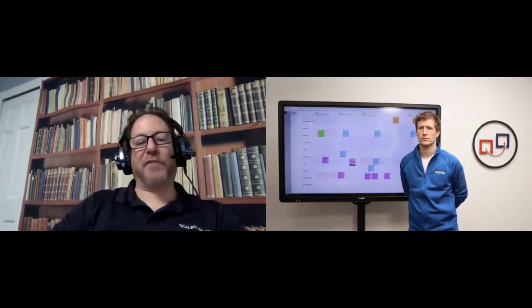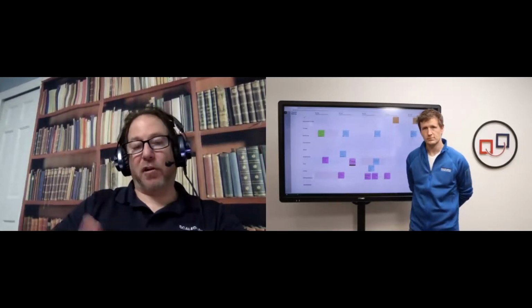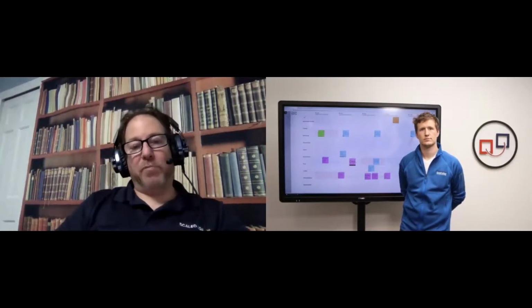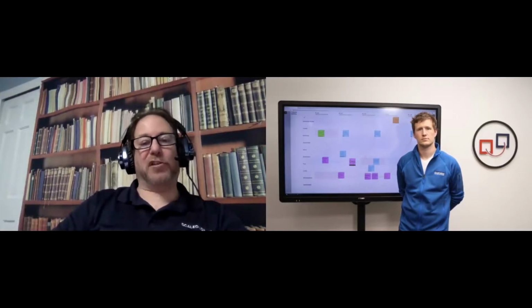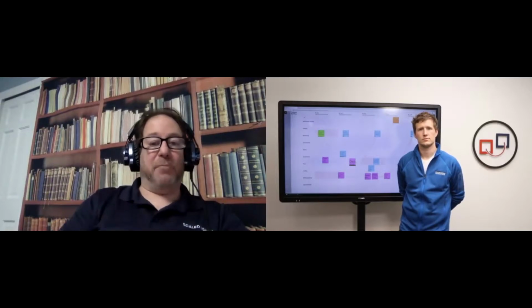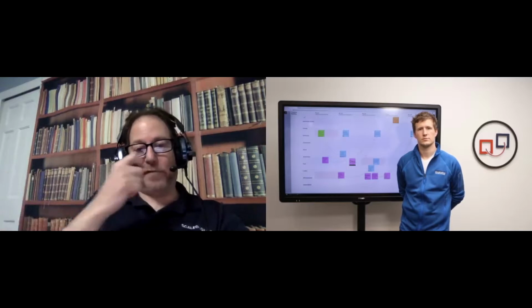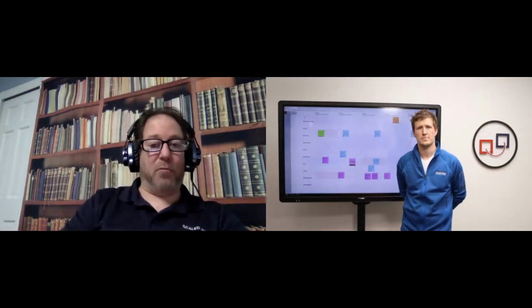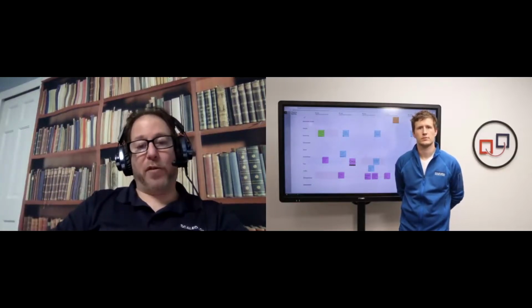So sometimes you have to have more written communication as a result. That's what I mean. You aren't always able to have overlapping time periods. So, for example, sometimes we record the business context so that we can play it at the same time in the US and China. The US would see the video in their early morning, and China can see it also in their early morning when we record the presentations.